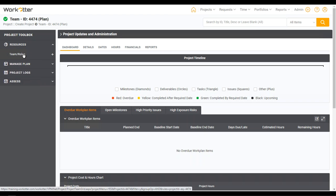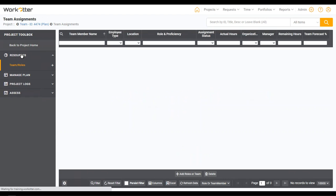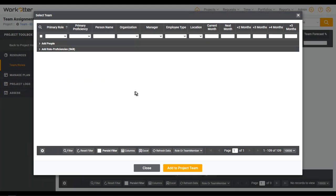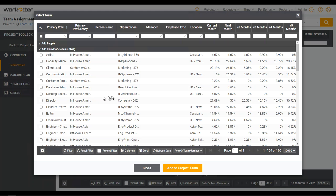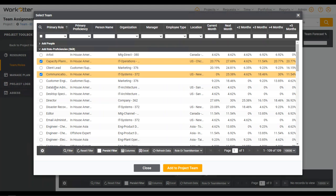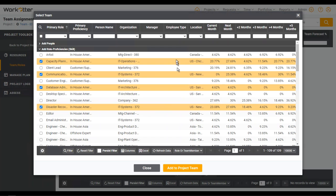I'm going to click on that link, and since there's nothing there it's going to be blank. I can click on the little plus, and this brings up a little wizard. In here you can expand or collapse either the people or just the generic roles. Here are all the generic roles, and I can select the roles that this project will eventually need. Notice the numbers off to the right — those are telling me, for the current month and every month thereafter for a total of six months, how busy that team or person is. So I can have some interesting resource management data at the time of need.